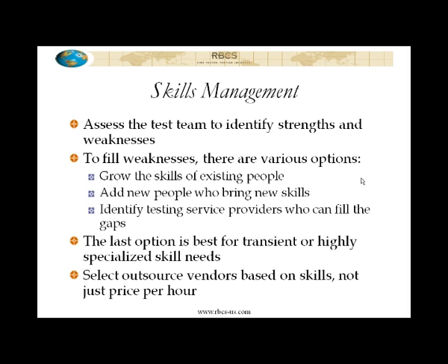There was a breakdown in the planning and estimation process. Now, I'm not saying that was the test manager's breakdown necessarily. The test manager may have been misinformed about how bad things were going to be when it was delivered. But nonetheless, the testing period should be estimated in such a way that it's not just long enough to get through every test once, but it actually includes regression testing, confirmation testing, waiting for bug fixes, and so forth, right?